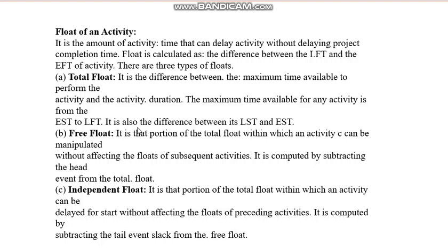and it is also the difference between its latest start time and earliest start time. It means this total float is the latest start time minus the earliest start time. Okay, now let us see what is free float.